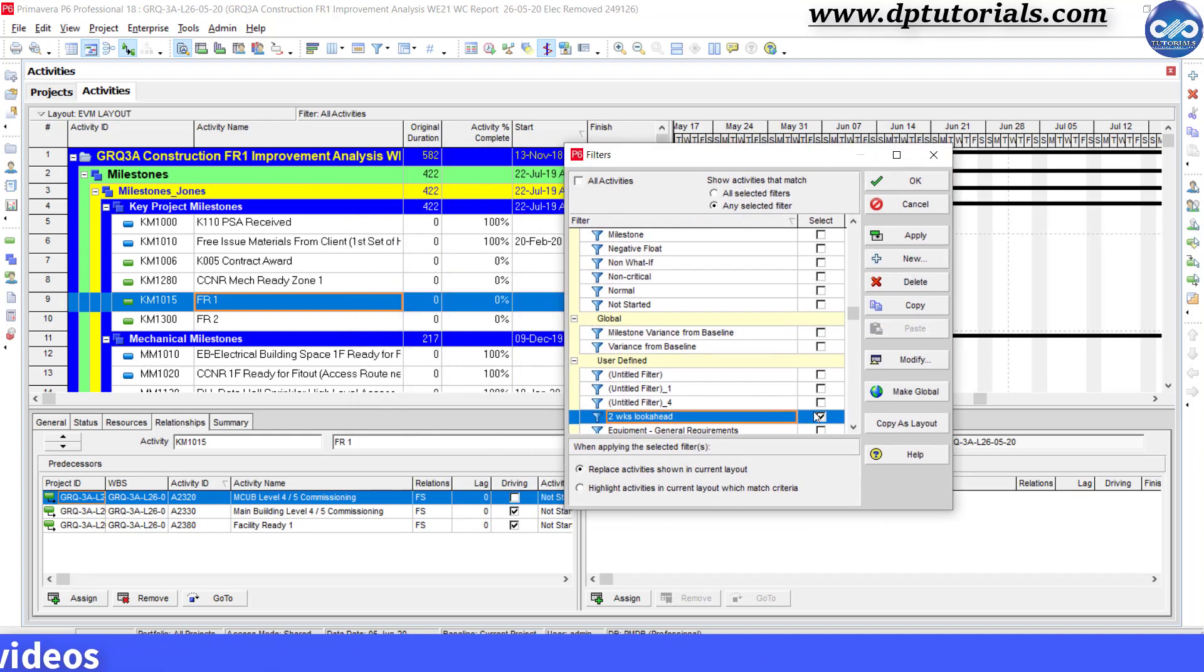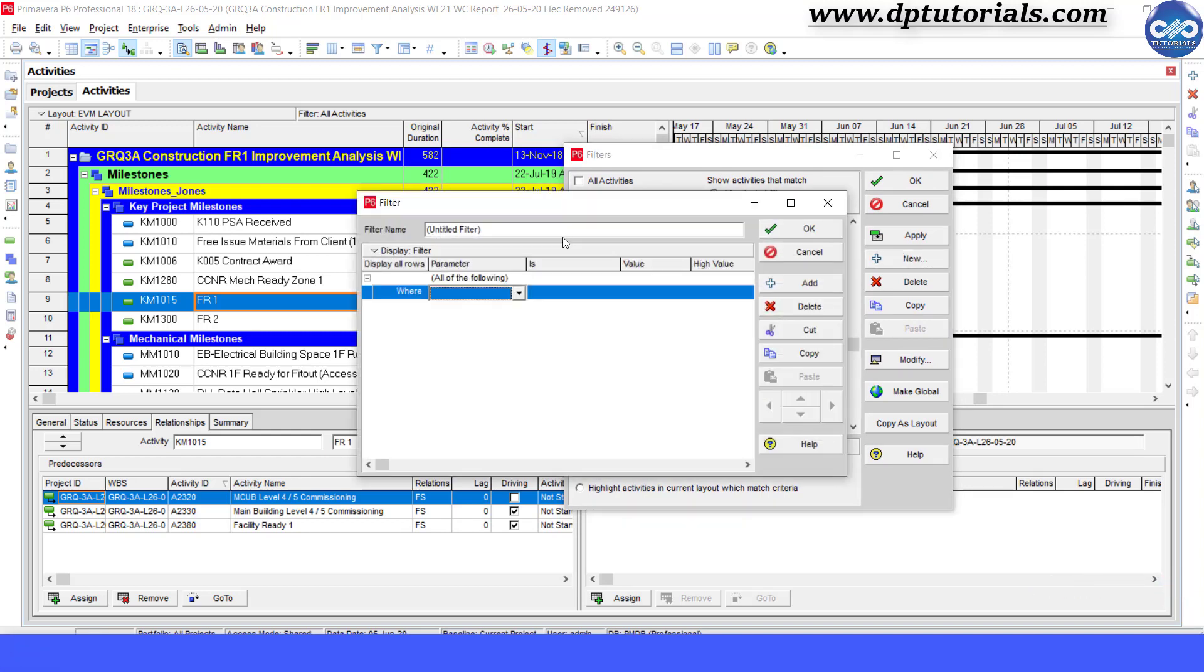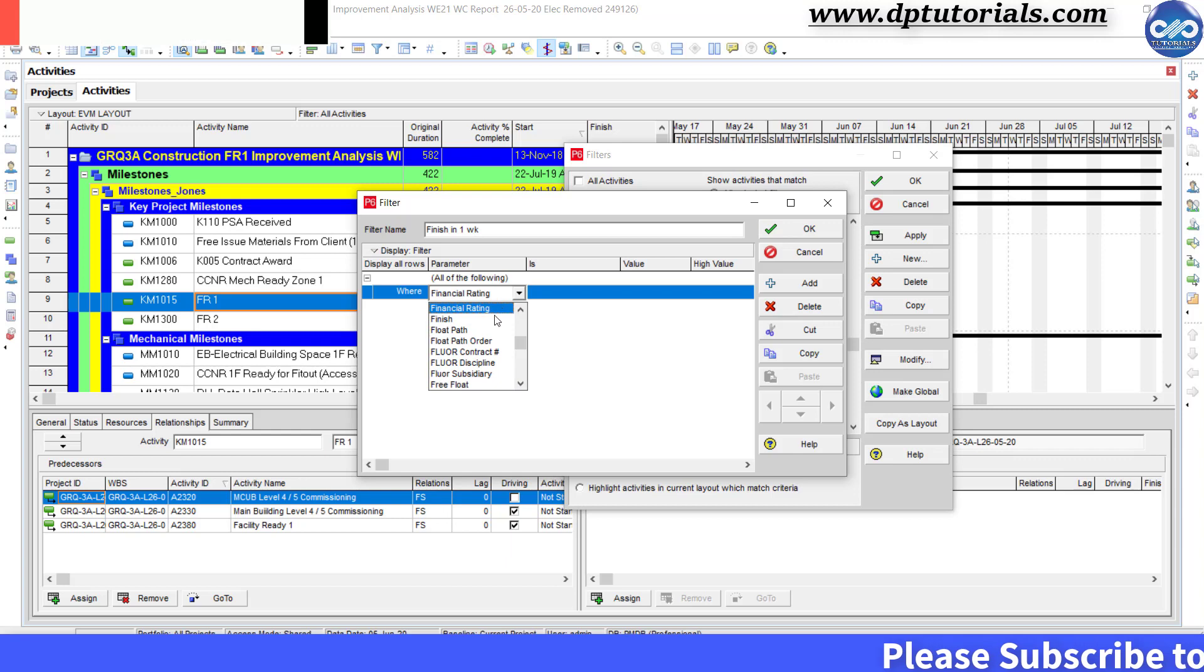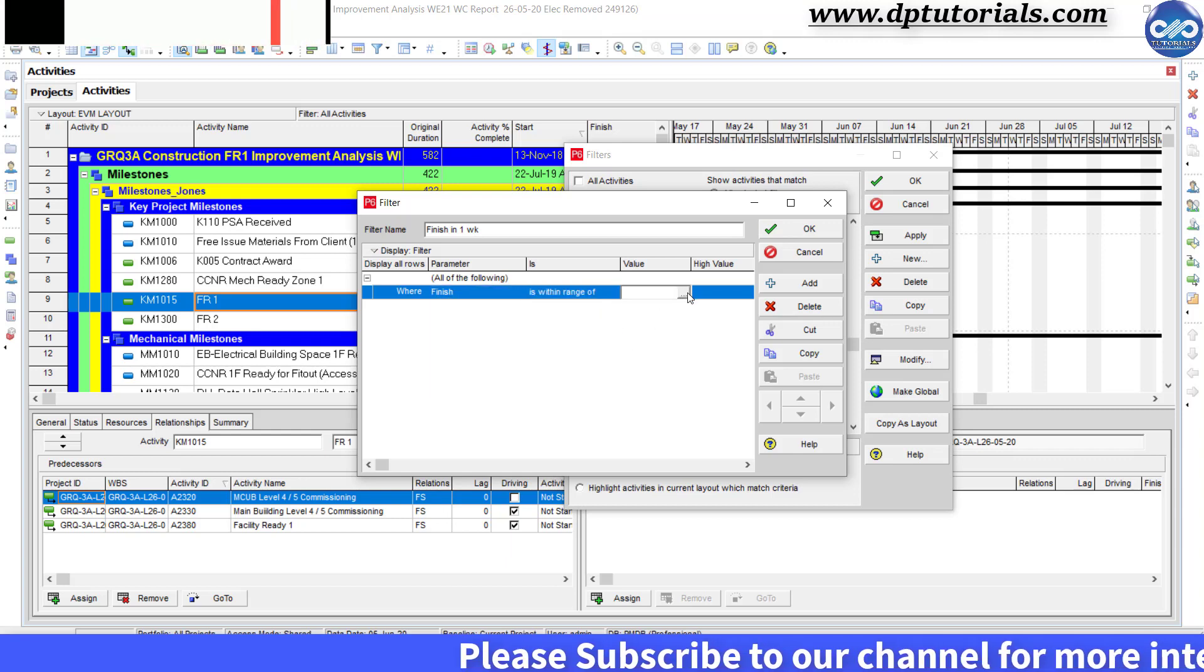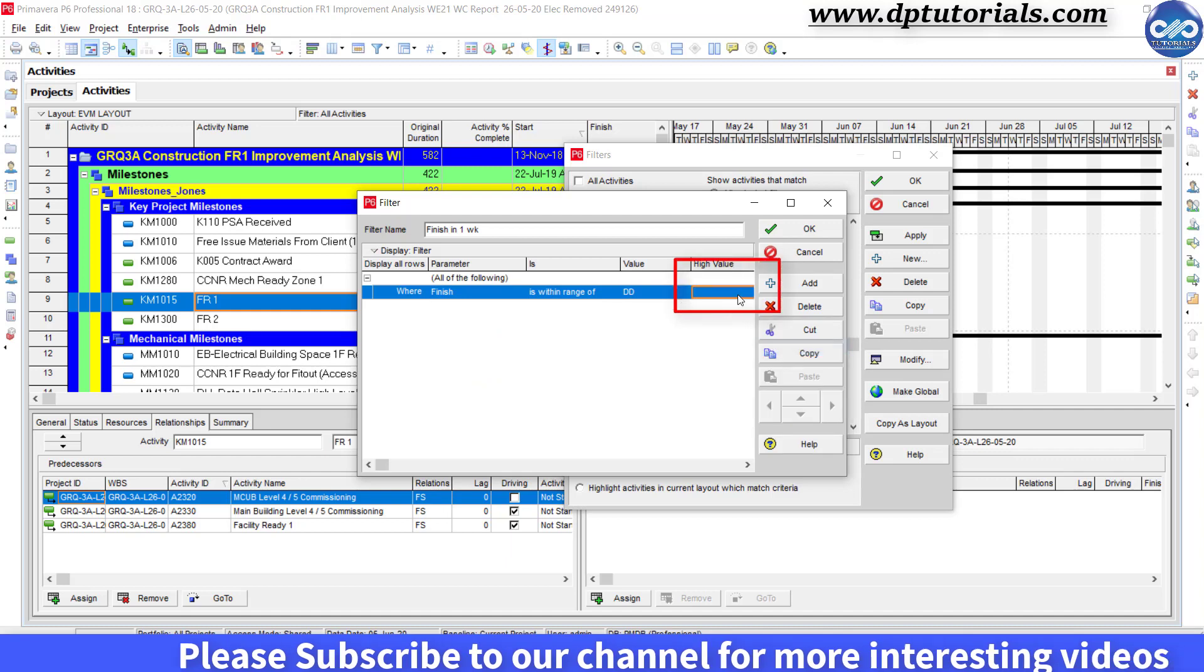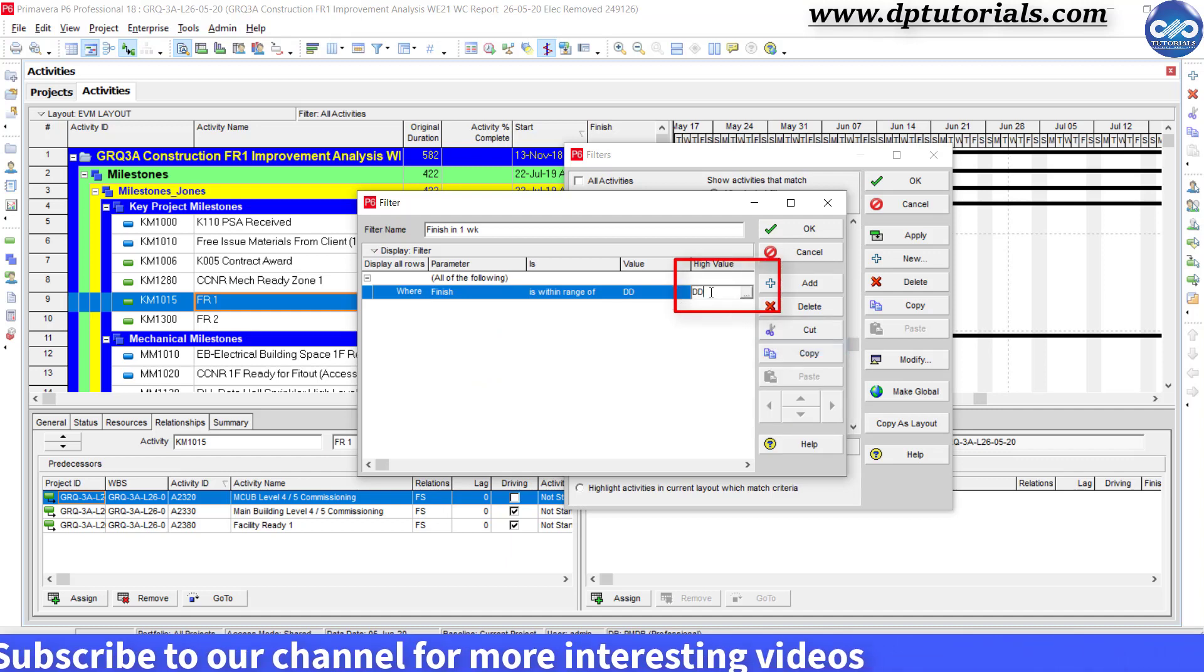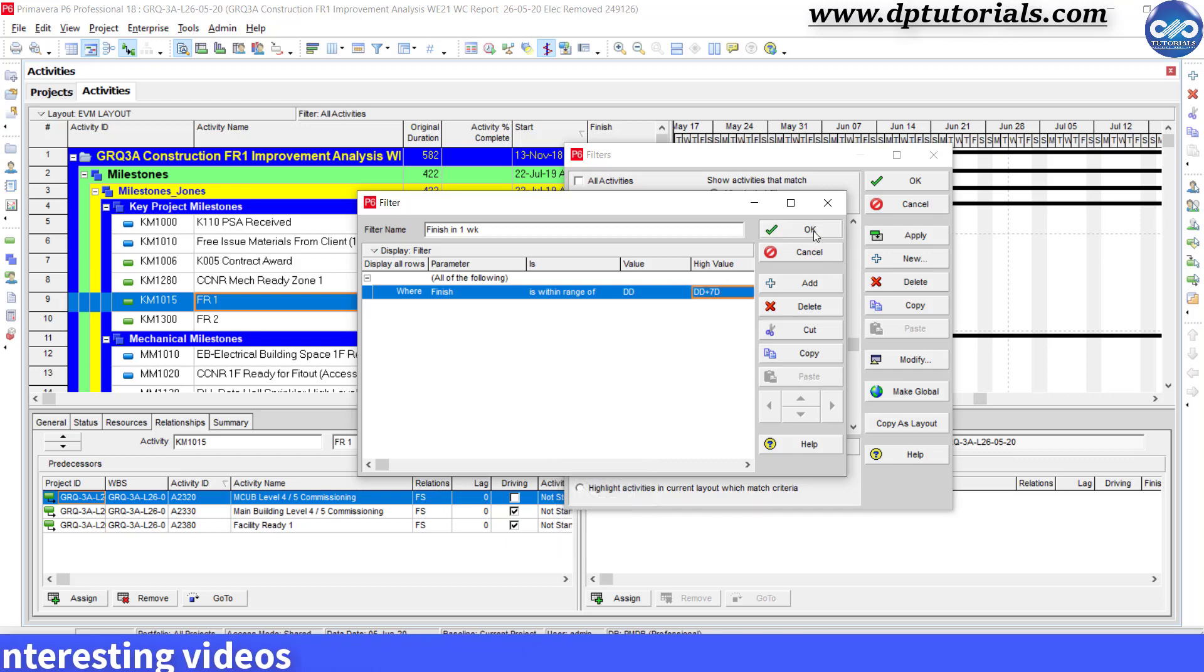Now let us create one more filter called as finish in one week and give condition as finish within range of DD and DD plus 7 days. Click OK.